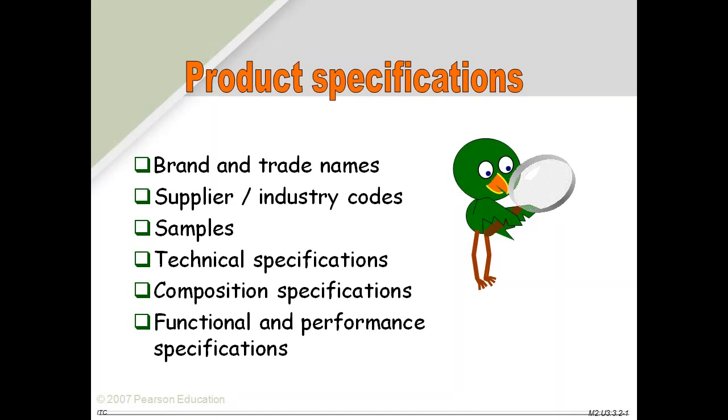Samples. As I said in the beginning, some people may use samples. Like say you are buying, I remember we used to buy the dresses for the peacekeeping people in different parts of the world. So if you give the sample of the shoes and the dress, that's again a lazy person approach. So we were normally encouraging people to write the complete specification, what type of material has to be used, what type of thread has to be used, what is going to be the color of the shirts. And the color also has to be given international code numbers.